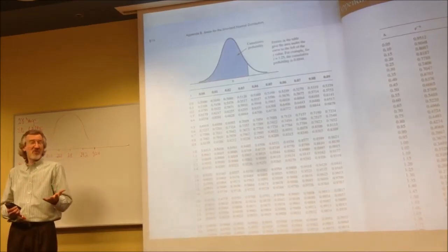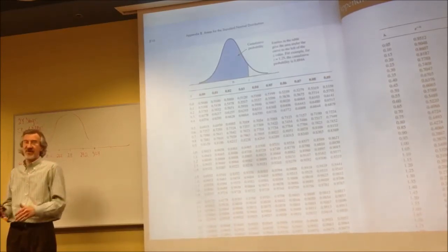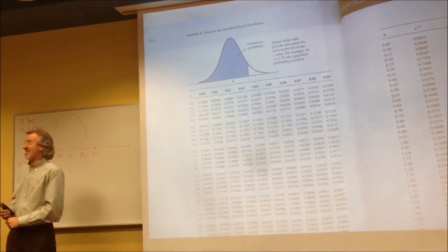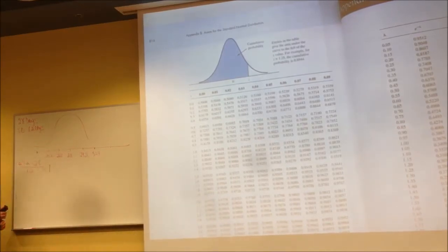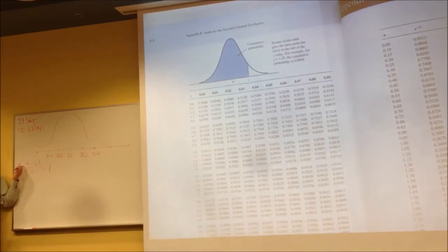Matter of fact, I would rather have a 10% chance or less. I want the odds to be hugely in my favor. I would love it to be a 1% chance. So it's at that point that I've got to start talking to the bank or whoever it is. Maybe we did a bond issue to get the money, whatever it may be. Most likely a banker or commercial lending bank. And I need to start negotiating to try to move the time in which this schedule is set up to pay this back, to increase my odds.